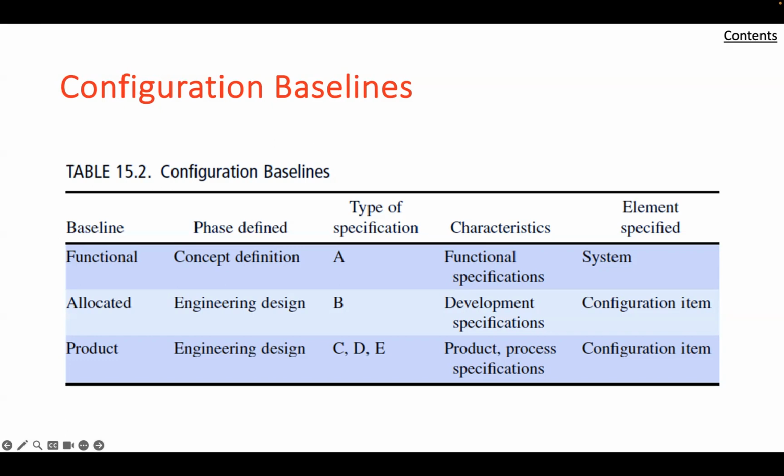A preliminary condition for effective definition and management of the given interface is to ensure the involvement of key persons and organizations responsible for the design of the configuration items. This is generally accomplished by means of interface control, interface configuration working groups, or their equivalents whose members have the technical knowledge and authority to represent the organizations in negotiating a complete, compatible, and readily achievable definition of the respective interfaces. In large systems, formal sign-off procedures have been found to be necessary to ensure commitment of the parties to the agreement upon interface control documents.